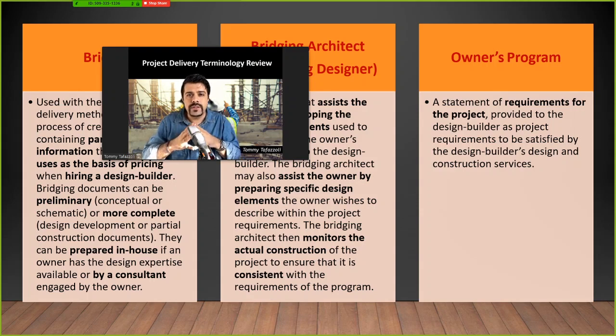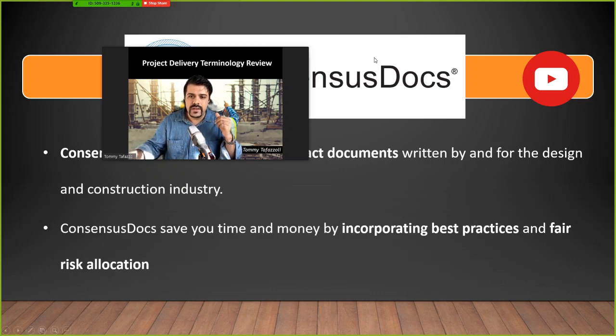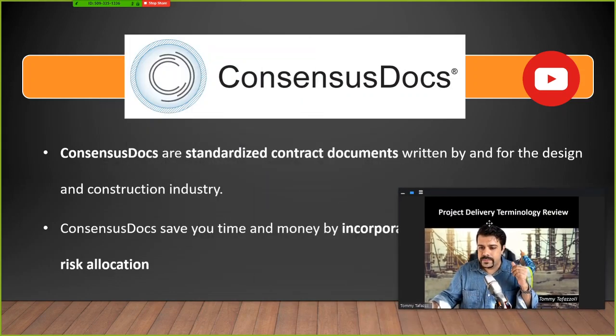So when the owner wants to limit the design by providing specific guidelines that need to be followed, the designer's power in matching the design with the resources on the field is reduced. So that is the drawback or downside of bridging documents.